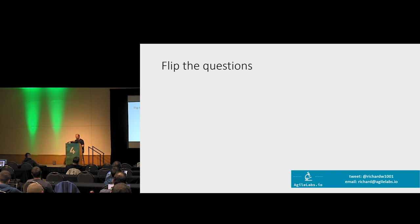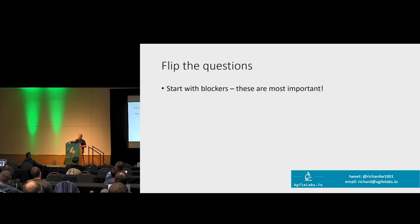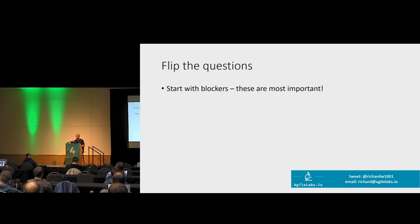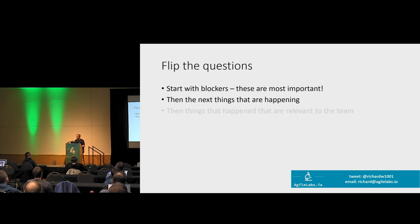Another thing that can really help is flipping the questions. The stand-up normally has three questions: what did you do, what are you doing next, and what's in your way? The most important of those by far is 'what's in your way?' — because if people are blocked, someone's going to have to help them. If you leave that till last, it ends up having no time, and miraculously no teams seem to be blocked, yet you speak to them ten minutes later and they're fighting a blocker. Just flip it around and start with 'does anybody want any help today?' Then 'what's next' is the second most important, and what you did yesterday is the least important.